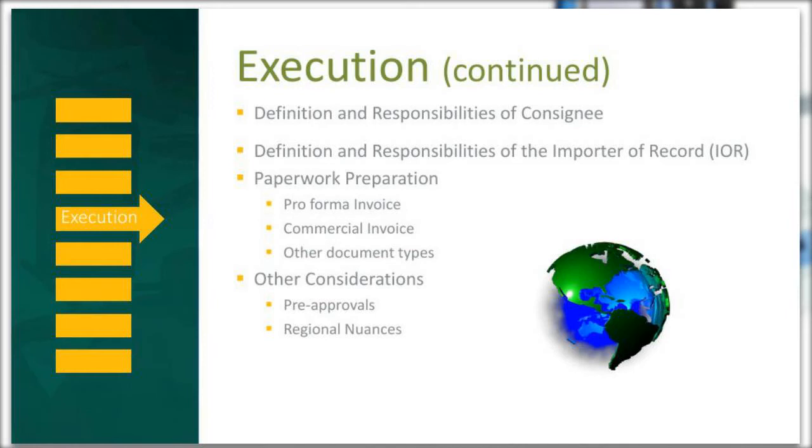Absolutely, Hope. And regarding the certificates of analysis and the certificates of conformity and the country of origin certificates, it's very important to note that the ancillary supplies that contain or involve electronics or measurable or measuring devices or Class II medical devices, these all typically will fall under these certification processes. These certificates will vary by country.